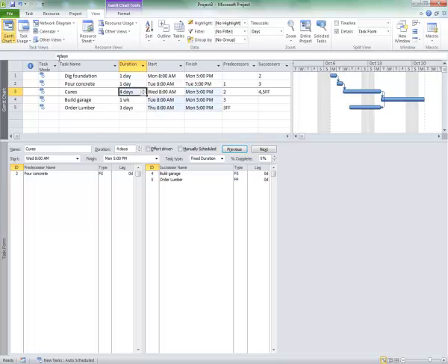So I'm going over and over this just-in-time delivery approach to drive home the fact that the typical use of different types of links in most project schedules becomes this: you need something to arrive just in time. Now, through years of using Project, I started out using start to start with the negative lag, found that too much maintenance, then got the aha effect, oh, just use finish to finish.